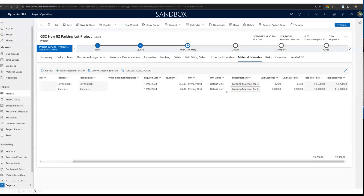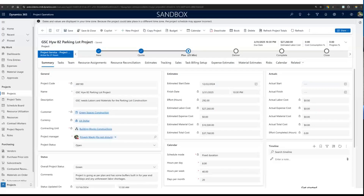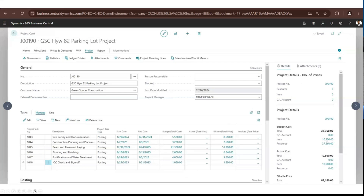Back in Project Operations, because I assigned resources on the project tasks, my estimated labor cost has populated. The same estimated labor cost will also populate in Business Central. I've also added material estimates for paper blocks and concrete under material estimates. When I add these, they go over to Business Central under project planning lines as type items, and the estimated material costs sync over as well.